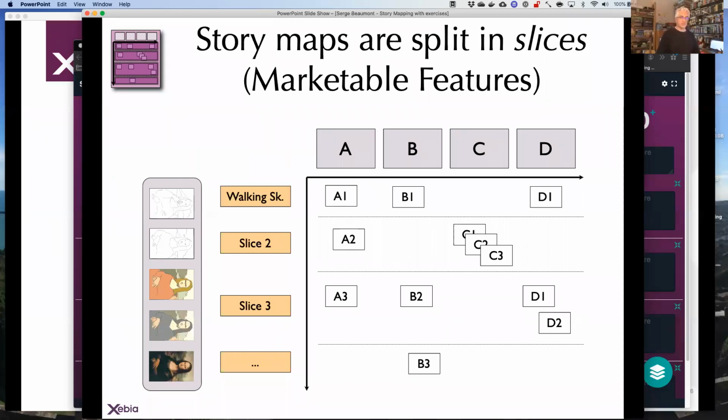And so this is the reason why literally every tool vendor has done it wrong, because they make A, B, C, and D the epics, whereas the walking skeleton, slice 1 and slice 2, should be the epics. So I hope with this change, if you use your own story maps, you can look at your own implementations and fix this for yourselves. And if you think that it's just me talking, I've actually checked it with Jeff Patton, the guy who coined the term story mapping. I checked with him, like, am I nuts or is this the case? And he said, no, you're right. That's the way it should be done. And that's also how he taught it to me. So I think it's important to note, be careful when you're using story mapping tools.